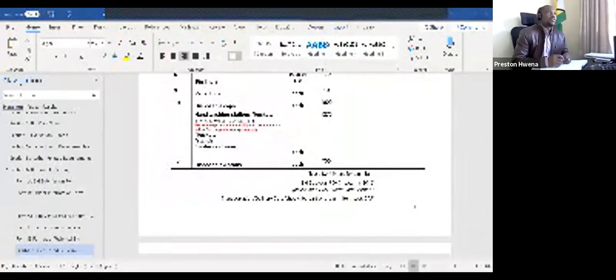Okay, normally what we do is that if you are awarded this order, we give you a purchase order, and on the purchase order we always put some notes to the supplier, which give you specific instructions to say, once your shipment is ready for shipping, before you ship, please let us know. Then you give us the commercial invoice, the packing list, as well as all the other related documents.